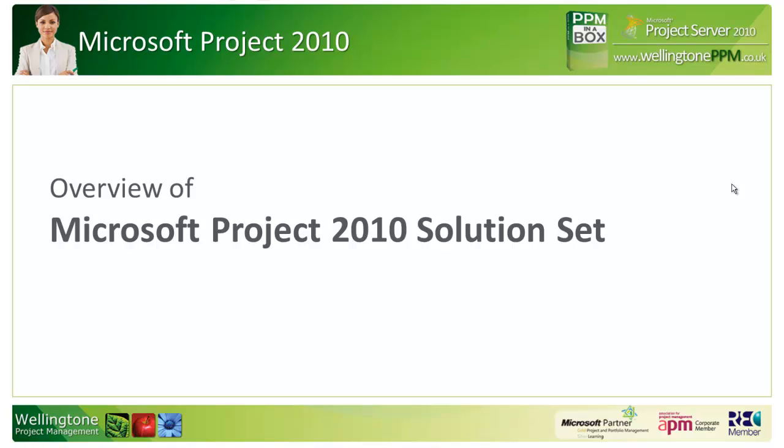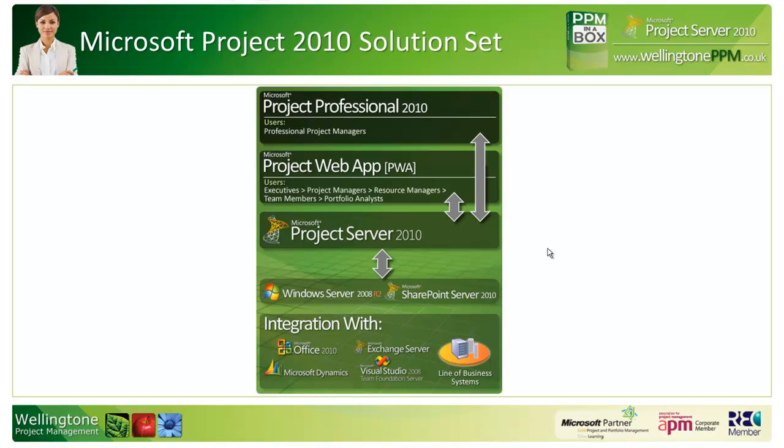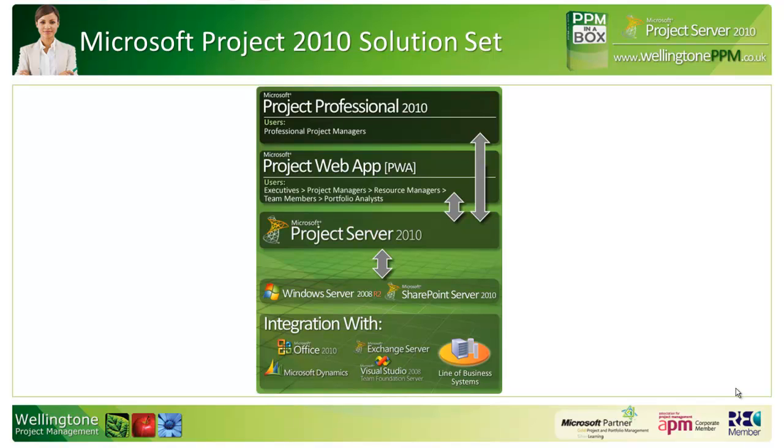Let's have a look at the overview of Microsoft Project 2010 and the components that make up the solution set. Centrally you have Microsoft Project Server 2010. That's really a central repository for project-related information, whether that's your project schedules, your enterprise resource pool, templates, anything project related. On a day-to-day basis to interact, most users will use what is known as Project Web App, shortened down to PWA. Depending on what group you belong to—whether you're an executive, project manager, or resource manager—you all go to exactly the same URL. However, thanks to security trimming, you can control not only what people see but also what people can do within PWA. So you might determine that the only group allowed to see the resource center, for example, are the resource managers.